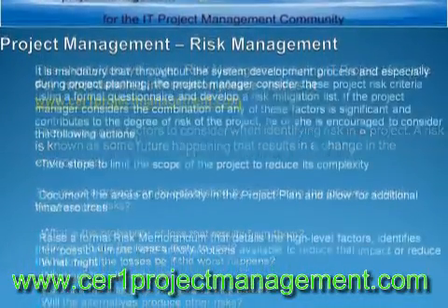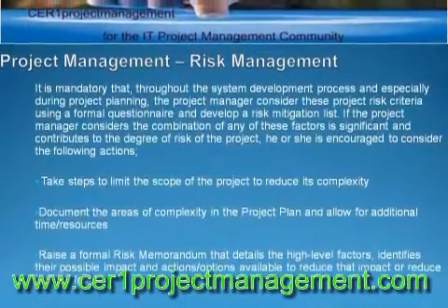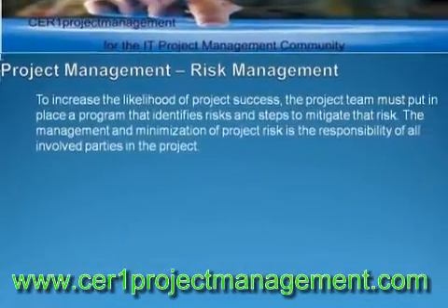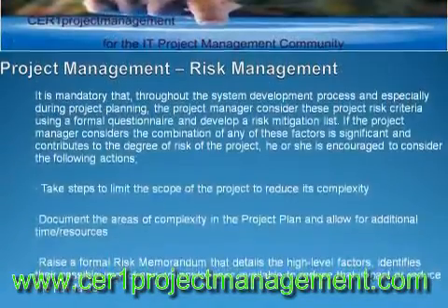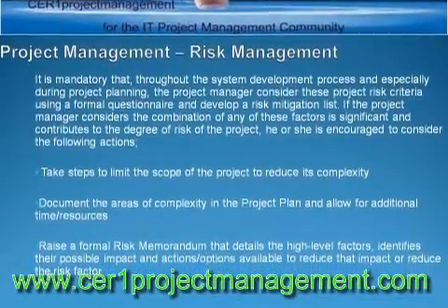It has associated with it a loss that can be estimated, a probability that the event will occur, which can be estimated, and a choice on the project manager's part as to what to do, if anything, to mitigate the risk and reduce the loss that will occur.